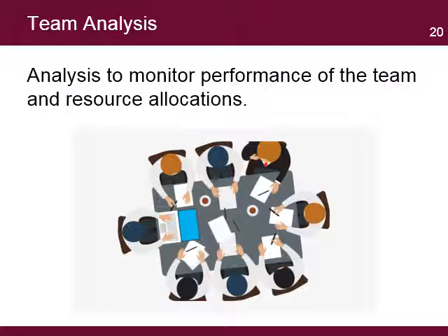Team analysis includes the review of the progress made by the team to develop the skills required to perform and the progress they make to complete the project activities. It also includes an analysis of roles and responsibilities to identify any gaps, duplication of efforts, or the need for additional staff in the case the amount of work exceeds the team capacity. The project manager will include analysis of the resources assignment table to determine if all the team members are being allocated the required amount of work effort and identify if there is a need to balance the work allocations amongst the team.